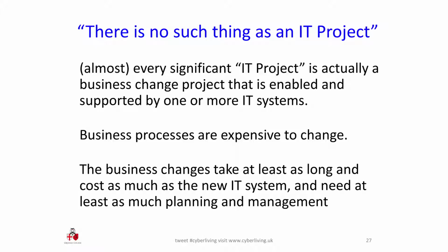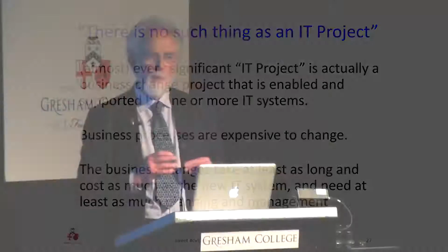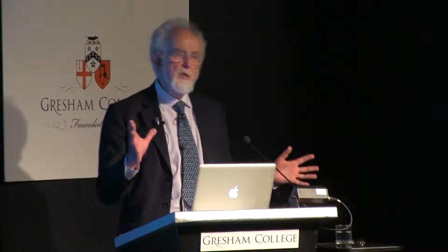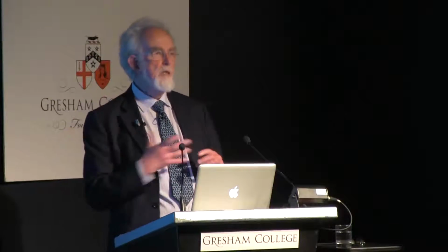And business processes cost a lot to change. From my experience, the business changes will take at least as long and cost at least as much as the new IT system. And they will require at least as much management attention and formal planning, proper project plans for